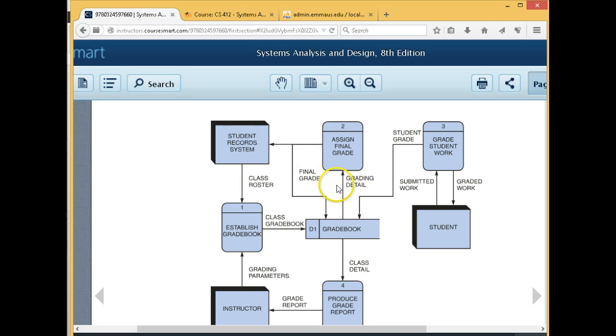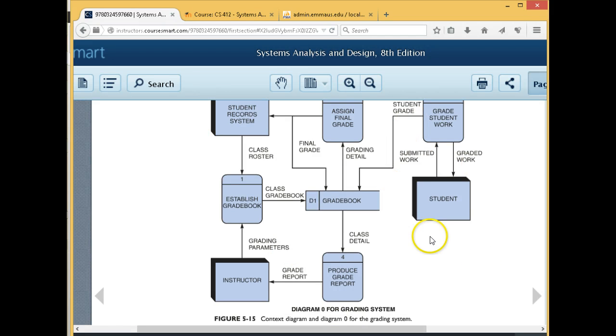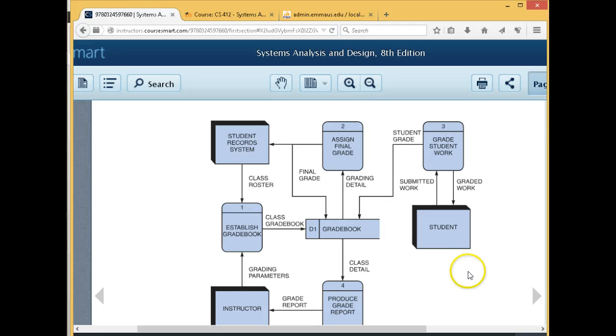So a challenge for someone would be, look at a system, verify, do the data flow documents that we started with match what we're actually doing today? That would be a job for someone that would have to understand the code, understand data flow diagrams, and help to train other people coming in to understand their system. And this is why adding another person to the system doesn't necessarily mean you get more done, because they have to learn all of this, and this all has to be made sure it's correct so that the person coming in knows, from this, how the system's actually working.